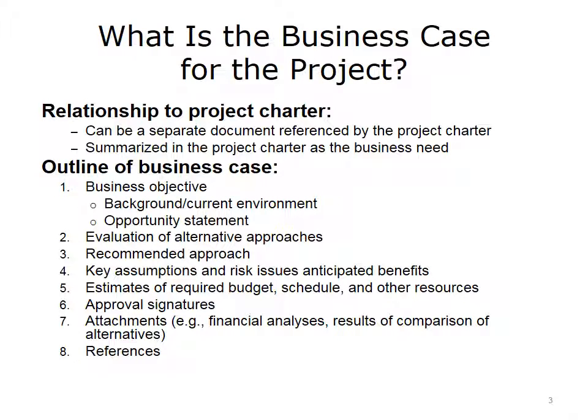The project charter is a record of why the project was undertaken in the first place. The business case for the project can be part of the project charter. The business case presents the business objective for this project. It answers questions such as, what is it, in business terms, that motivates you to undertake the project?